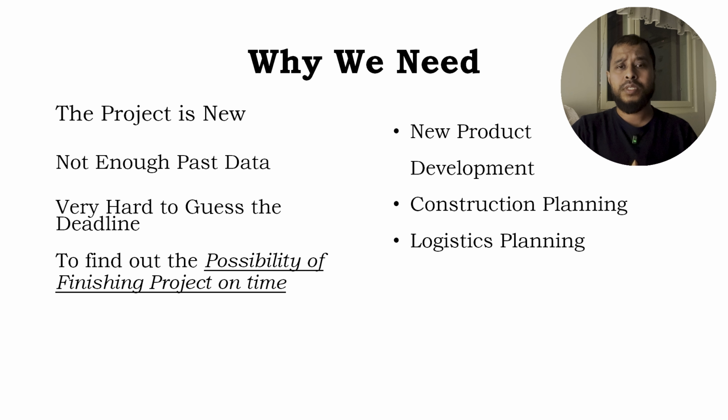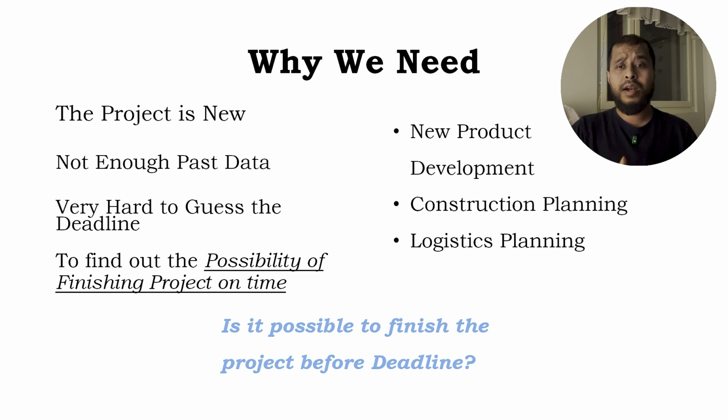But PERT steps in when the project is novel, data is scarce, and accuracy matters. It doesn't just give you a single timeline, it provides probabilities so you can make informed decisions. For example, is there a chance you will finish the project before the deadline? That's the kind of insight that empowers you from PERT.